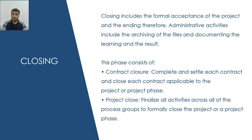The final step in the traditional approach is closing. Closing includes the formal acceptance of the project and the ending thereof. Administrative activities include the archiving of files and documenting the lessons learned and results. This phase consists of two things: contract closure and project close. Contract closure includes the complete and settlement of each contract applicable to the project or project phase. Project close includes the finalization of activities across all process groups to formally close the project or project phase.